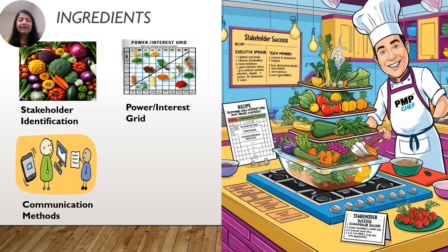Just like that, if the stakeholder is going to have high interest or high power, we have to update those stakeholders every couple of days, or as agreed with the stakeholder and listed in the engagement plans. So we have to have effective communication methods while preparing an effective stakeholder management plan.